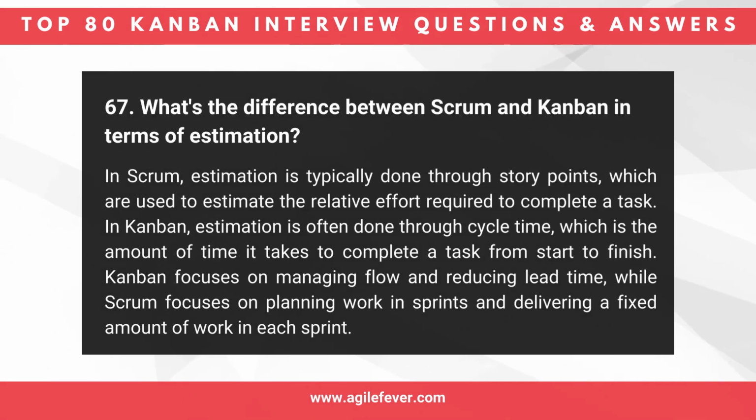Question 67. What's the difference between Scrum and Kanban in terms of estimation? In Scrum, estimation is typically done through story points, which are used to estimate the relative effort required to complete a task. In Kanban, estimation is often done through cycle time, which is the amount of time it takes to complete a task from start to finish. Kanban focuses on managing flow and reducing lead time, while Scrum focuses on planning work in sprints and delivering a fixed amount of work in each sprint.